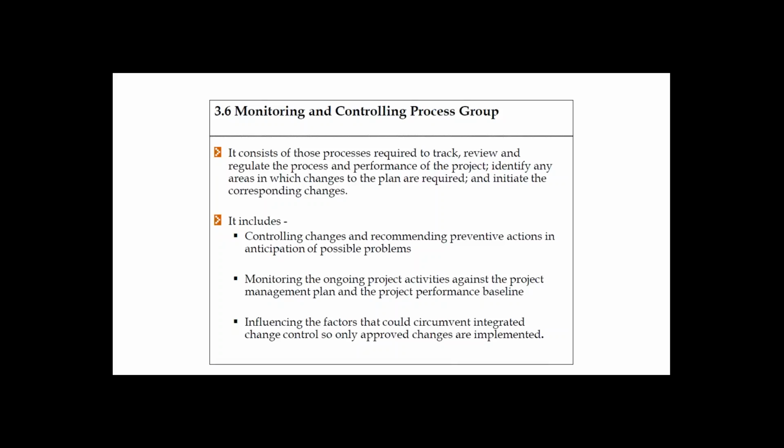On top of doing the individual tracking, like what Vinith explained, as the project progresses, we need to track the progress of the project or the activity. So you need to use this baseline. For a schedule baseline, it can be simply a project plan, a Microsoft Project plan, with the details of all the milestones and individual tasks, when we need to complete them, what the dependencies are, and everything.